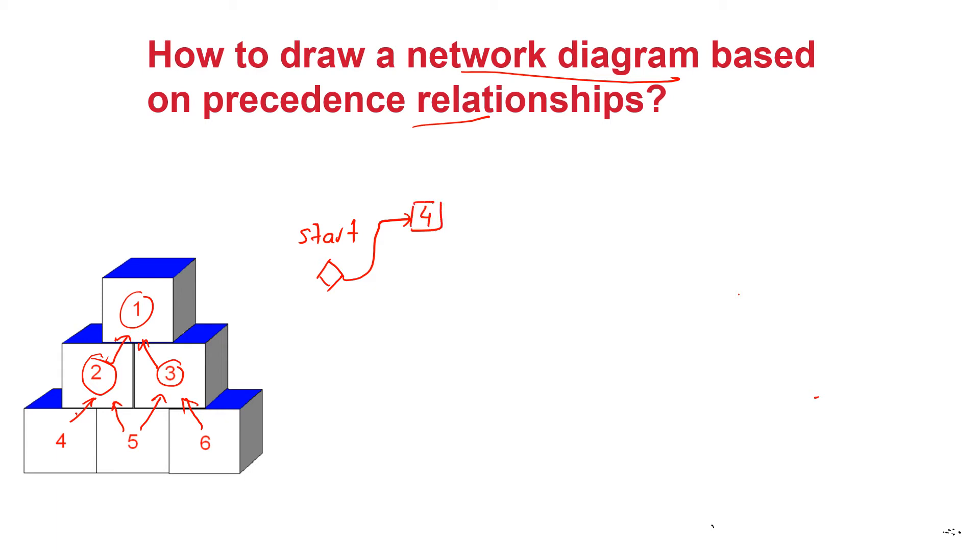So I'm placing 4, 5 and 6 soon after the start activity. Now activity 2 can only take place once activity 4 and 5 have been completed. So the start of activity 2 is dependent on completion of activity 4 and 5, and this type of a relationship is also referred to as a finish to start relationship which means that activity 4 must finish and likewise activity 5 must finish before we could commence work on activity 2.